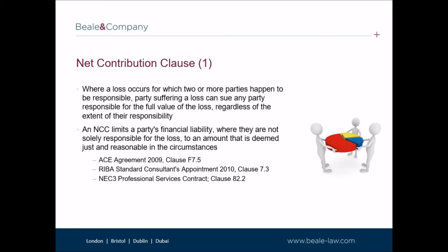We also recommend that net contribution clauses are included in appointment documentation. The reason for this is where a loss occurs for which two or more parties are responsible, the claimant, or the party suffering the loss, can sue either of the parties responsible for the full value of the loss, regardless of the extent of the responsibility. Yet this position still surprises people.